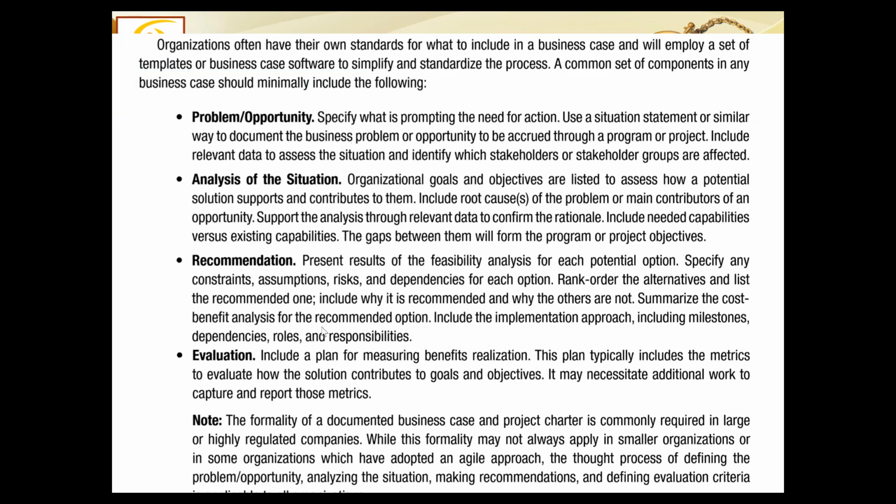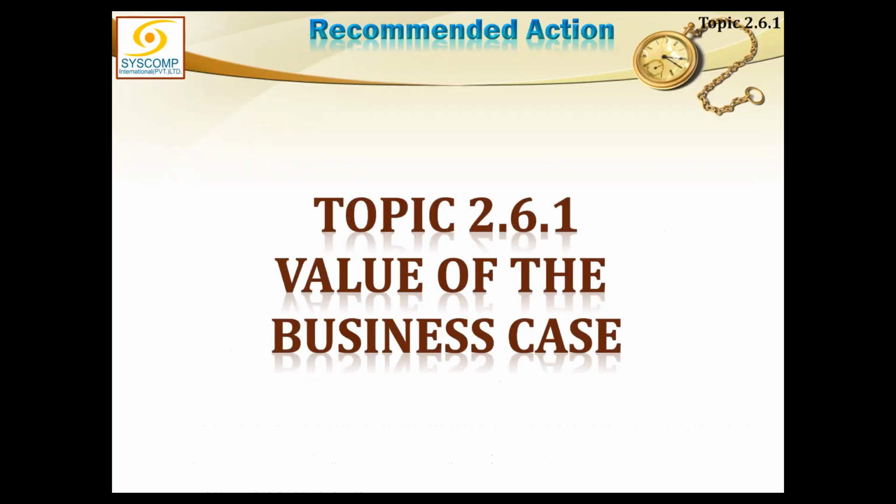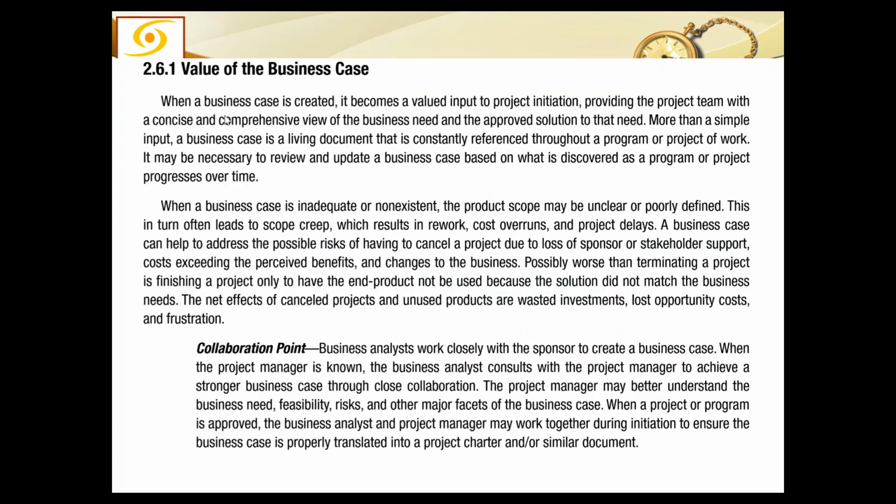और बिजनेस केस में क्या एड्रेस करना है? यू हैव टू एड्रेस द प्रॉब्लम एंड अपॉर्चुनिटीज, एनालिसिस ऑफ द सिचुएशन, योर रिकमेंडेशंस, योर एवेल्युएशन, ये वो 3-4 आइटम्स हैं जो बिजनेस केस में हमने डिफाइन करने होते हैं। और अल्टीमेटली वैल्यू ऑफ द बिजनेस केस जो है, व्हेन अ बिजनेस केस इज क्रिएटेड इट बिकम्स अ वैल्यूड इनपुट टू प्रोजेक्ट इनिशिएशन। इनिशिएशन का इनपुट है ये, आपको याद है ना, चार्टर जब बनता है तो बिजनेस केस इज अ इनपुट।